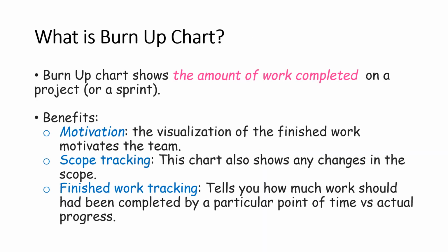Now let's talk about burn up charts. So burn up charts show the amount of work completed on a project or a sprint, unlike burn down, which shows the amount of work remaining. So the benefits of burn up charts are that it increases the motivation because the visualization of the finished work really motivates the team. The second is the scope tracking.